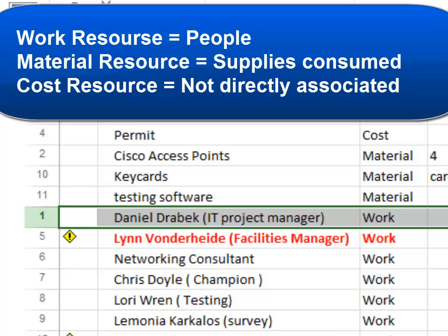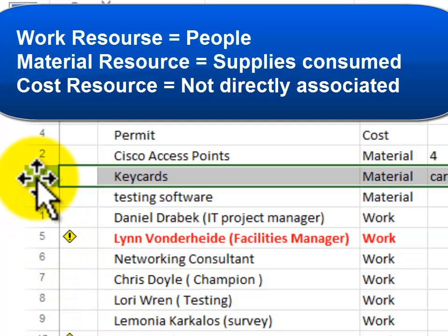The second kind of cost that we incur is not one that goes out by time or is paid out by time, but is one that is paid out on the basis of quantity. So here my key cards are, and my key cards are paid for individually. Notice that they're $5 a key card, and we're going to pay for them as needed, but we're going to pay for them in one cost. So each one of us is going to cost $5. You can't get one for $3. You can't pay out $2.95 every Sunday, but it's going to be a one-time cost of $5 per card.